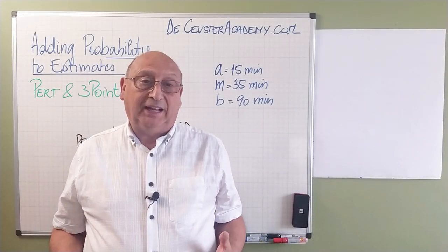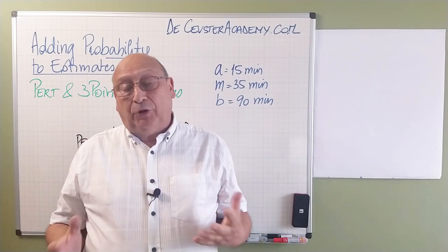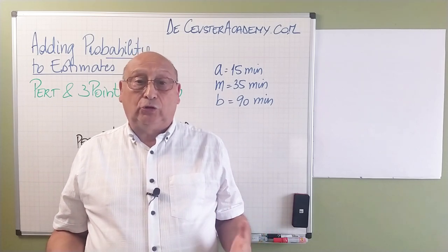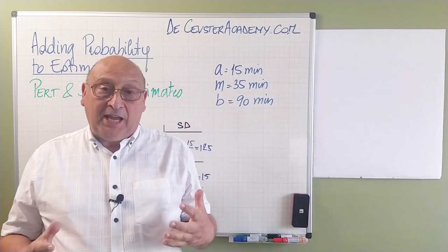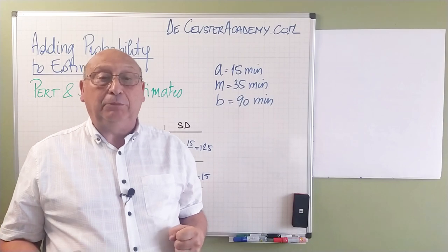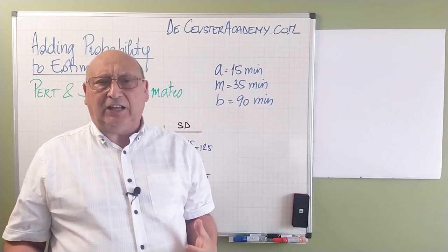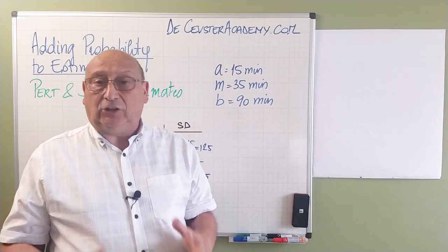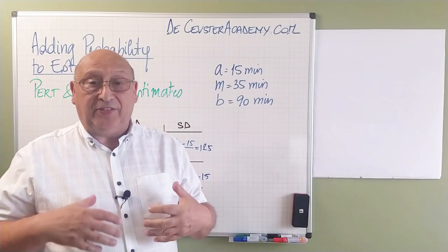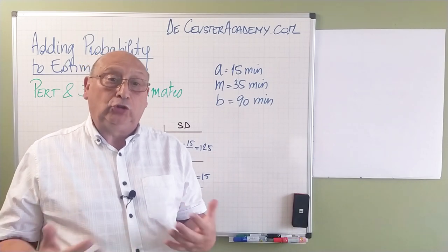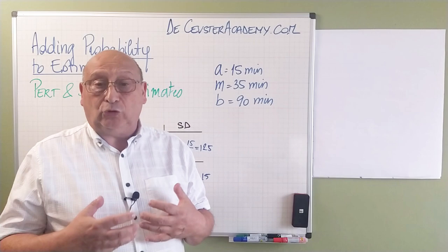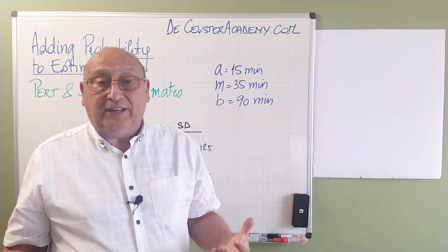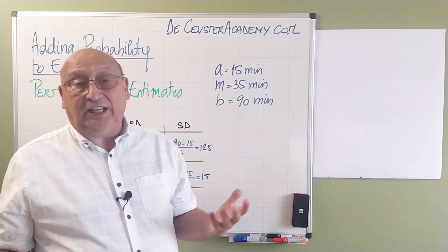Using the PERT and the three-point formulas is not difficult — they are simple calculations — but we have to determine the values A, M, and B. In our example, I've taken a trip of 15 minutes in the most ideal circumstances: everything works perfectly, no waiting time. The mode is 35 minutes, which from experience is typically the most frequent travel time from A to B. In the pessimistic case, due to natural variation, we arrive only after 90 minutes. These extreme values are only happening with very small probabilities.